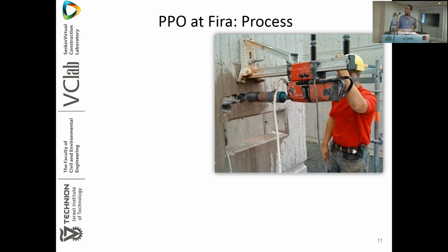Next in this process, in this picture here, is someone drilling a hole in a concrete wall. Once they had a stable team that was moving from project to project, they could start looking at the process in ways which weren't possible in a typical project. And one thing they saw was, part of the work was drilling holes in concrete with a diamond drill. They found that because it was subcontracted out to someone who was not inside the lines, they had to wait to build up a whole batch, and it was incremental filling. And they ended up buying a diamond drill for one of the subcontracting teams so they could do the work in one piece flow fashion.